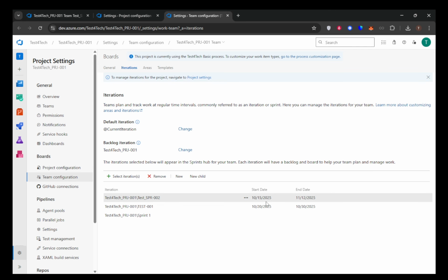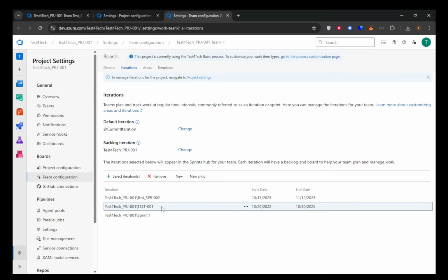Importantly, ensure that the dates for your current sprint align with your intended time frame. Once the finish date passes, the system will mark the sprint as passed. Finally, let's talk about the role of the system in marking the sprint as passed. After the finish date, which is tracked in UTC, your sprint's time frame will automatically update to show as passed.